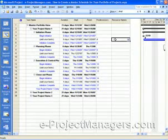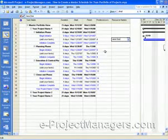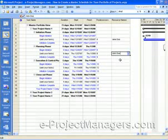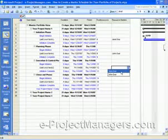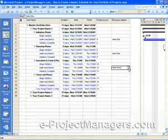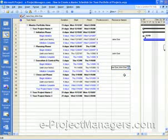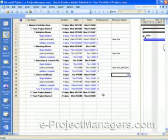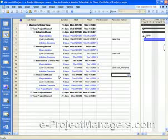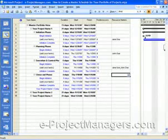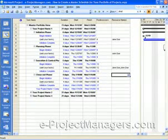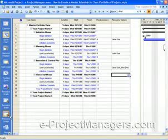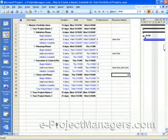Let's say I open up my project here, and I'm putting resources in. Let's just say Jane is working on this task, and John is working on this task, and maybe the two of them are working together on this task. But anyway, you get the idea. You can build your resources in the Master Schedule, or when you import your resources, if they already have resources in the schedules, those will come over and be in your Master Schedule. But you will need to clean them up if they're duplicate names.